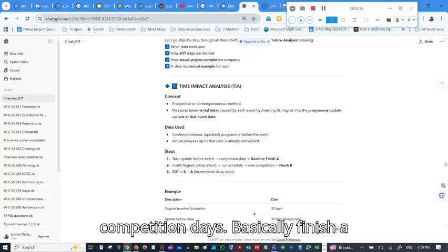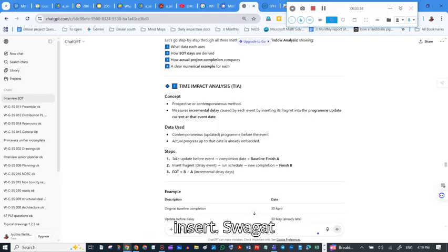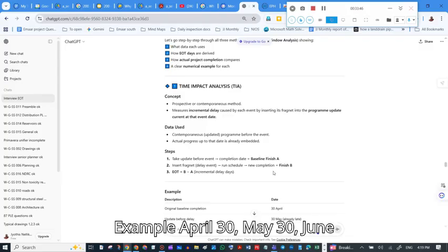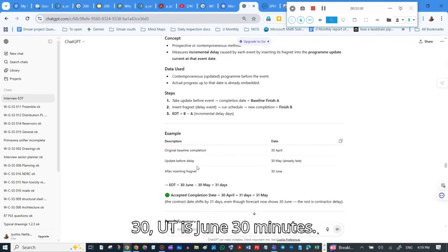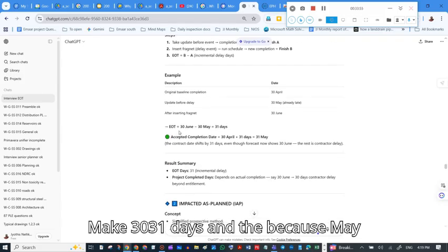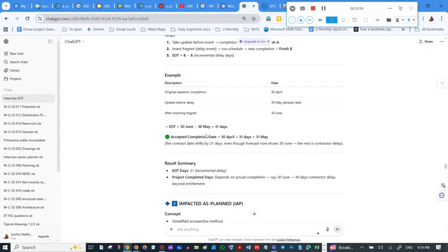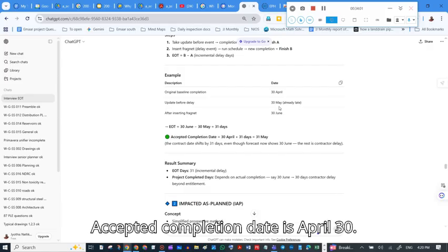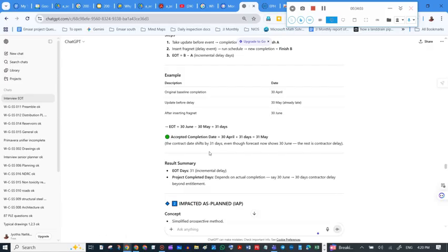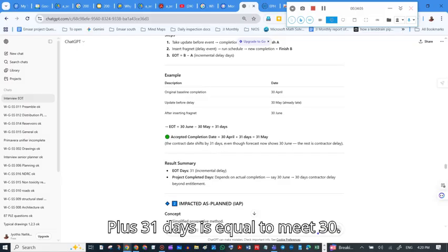Baseline finish A, new completion date finish B, EOT is B minus A. Example: April 30, May 30, June 30. EOT is June 30 minus May 30, 31 days, because May 30 is the contemporaneous update completion date. Accepted completion date is April 30 plus 31 days, equal to May 31.